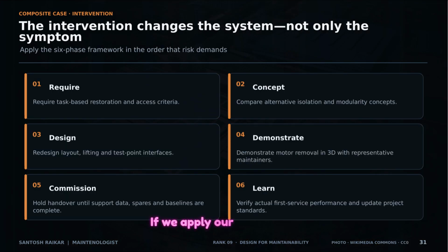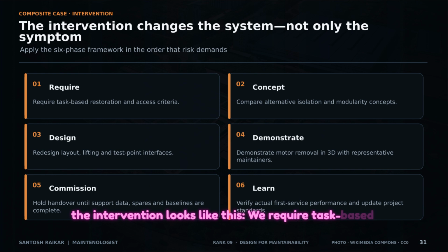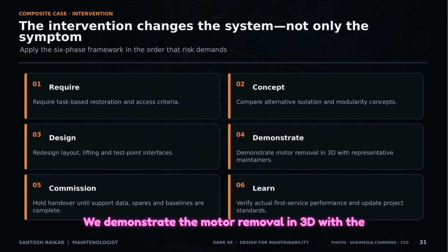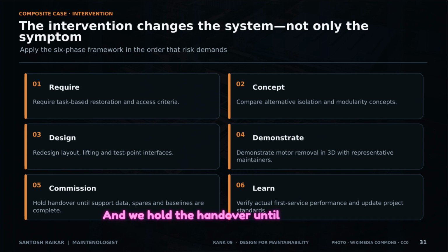If we apply our framework, the intervention looks like this. We require task-based restoration criteria. We compare isolation concepts. We redesign the layout for lifting. We demonstrate the motor removal in 3D with the guys who will actually do the work. And we hold the handover until the data is 100% complete.